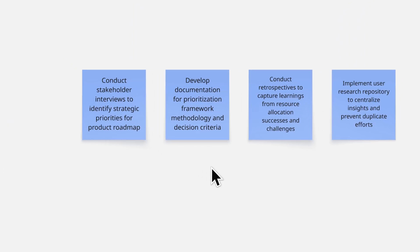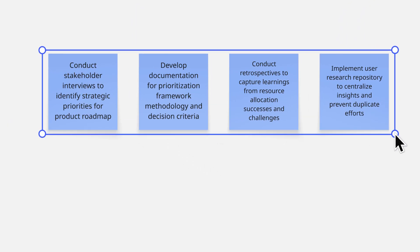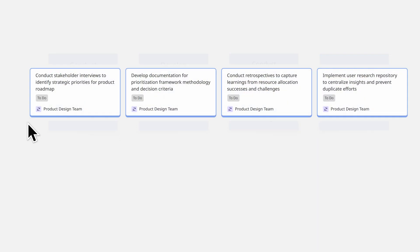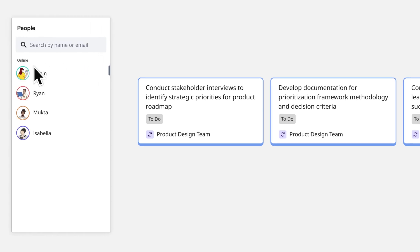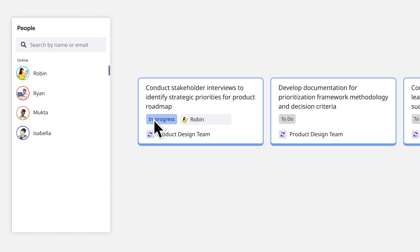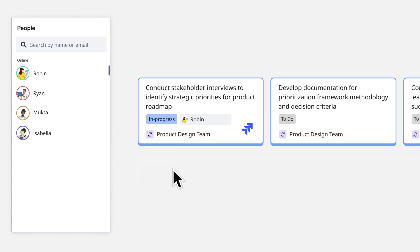On the other hand, if we want to use it for internal planning and organization, we could create a much more granular version just for our team by converting stickies into cards and breaking them down into specific tasks or action items. We can assign tasks using the people widget, update cards as needed, and convert them to JIRA or Azure for future task tracking once the roadmap is set.